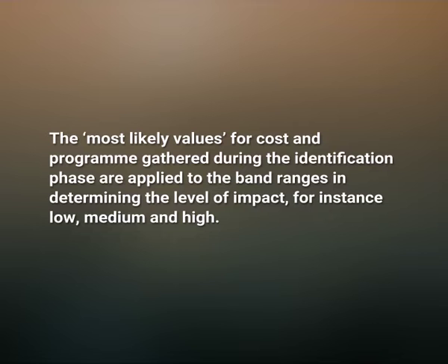For instance, low, medium, and high. The cost and program impact may fall into different levels of severity for any particular risk. In this event, the worst case result is used for overall ranking.